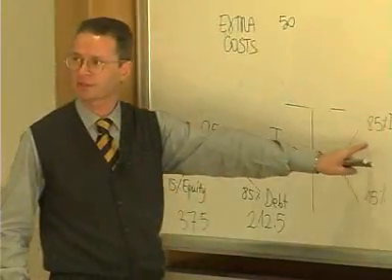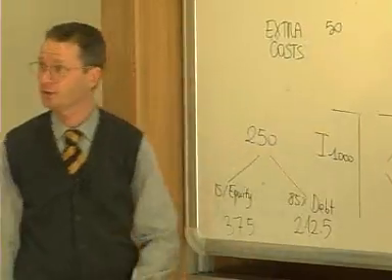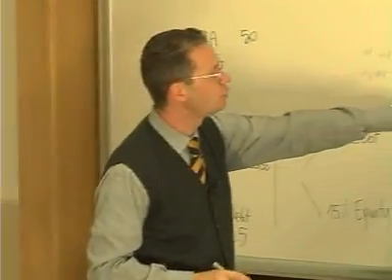But if I use only a standby facility, and so if I cover this extra cost only resorting to the standby facility, I will alter the ratio between debt and equity. It is obvious, because I will use 850 plus 50 is 900, and 900 over 1,050 is no more 85 over 15. For this reason, when banks negotiate a standby facility into the debt package, they require the inclusion into the equity contribution agreement of the so-called standby equity, meaning that every time an unexpected cost arises, this extra cost must be financed again, partially with debt and partially with equity, that is, in standby until an unexpected event occurs.